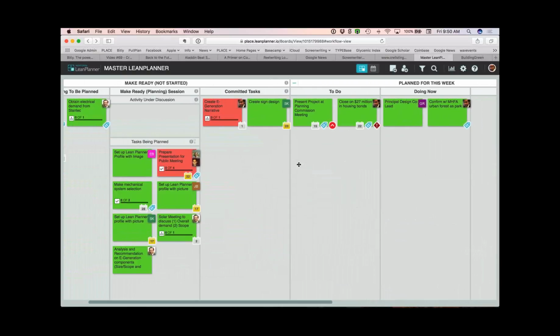So, Alex, go ahead. Yeah, what I was going to mention is, Alex had mentioned that this is not a scheduling tool. Longer term overall could be P6 or a scheduling tool that Stantec might be using. So, Alex, what I hear from you is this is more a short-term granular tool for managing the tasks and activities on the lean planning methodology, right? That's exactly right. So there are two layers to this. One is a longer-term P6 critical path method that ties together everything, but this is a short-term tool for managing commitments on activities and tasks.